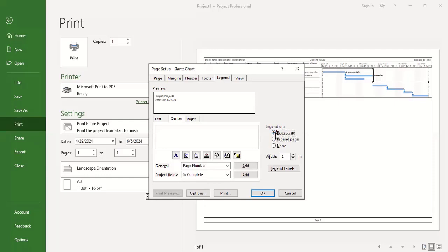But normally, I personally use legend on every page, because in case you prepare that and you assume that the person you are producing this for actually understands program of work, and at the end you discover that you gave it to somebody else that doesn't understand program of work, the legend will actually help the person to understand what you prepared. So it's better as a project manager to leave it on every page. It is left for them to read the legend before reading your schedule.